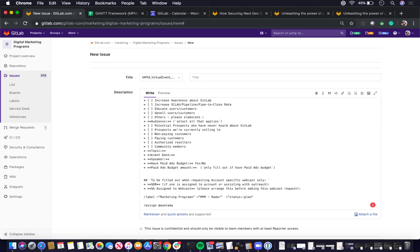So next, once you've got confirmation and you move the status from plan to WIP, you're ready to proceed with creating the GAN chart, the epic, and the subsequent NPM support issues.